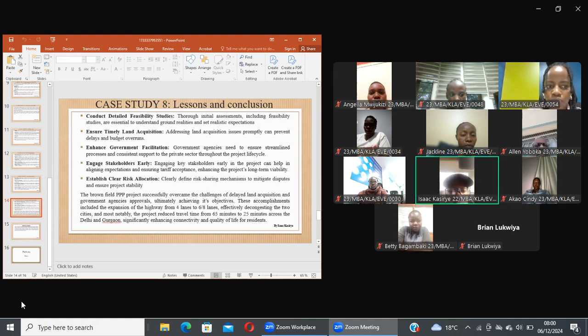Thank you, Cindy. The lessons that were learned in the highway project were, first, the need to conduct a detailed feasibility study, through an initial assessment that takes into account ground reality and realistic expectations.